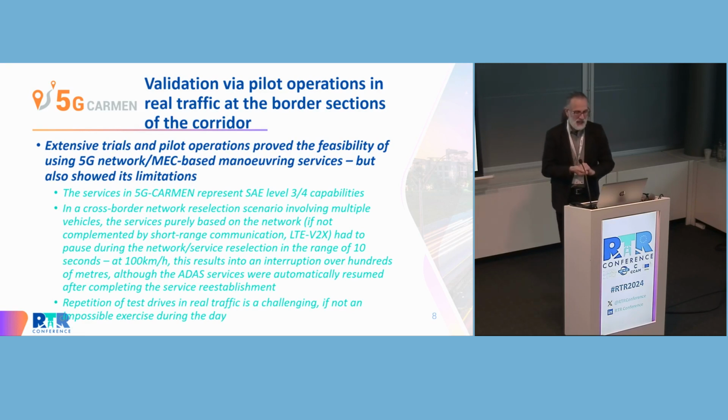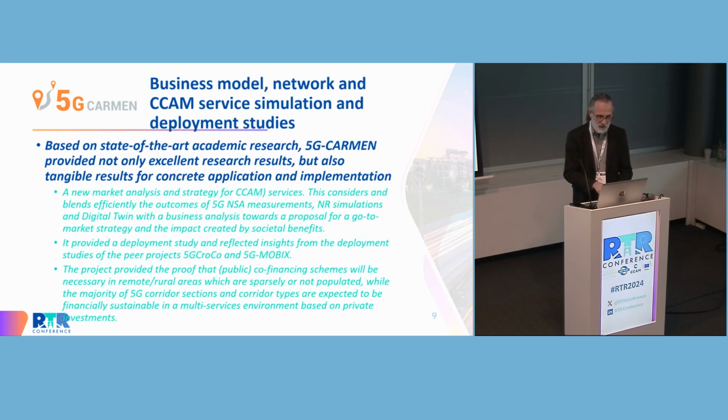What I also would like to mention is that the repetition of test drives in real traffic is definitely challenging. If you want to replicate the results in a real traffic environment during the day, it's always changing, even within the same hour. You have different results over time. So that is one of the challenges any project has to consider in real traffic environments. So either you increase the number of iterations in that regard, or you complement these by trials run or performed on test track environments, for example. So that's something I would give as a recommendation, basically.